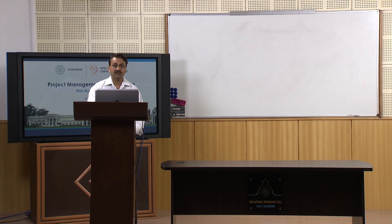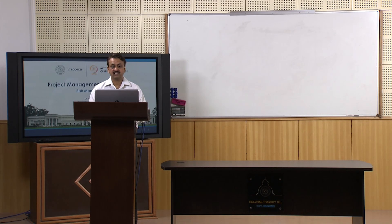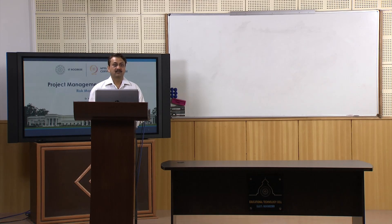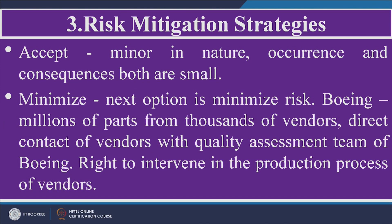That was the second point — risk analysis. There are four points in the risk management process: the first was identification of risk, the second was analysis of risk, and now let us look at the third point, which is risk mitigation — how to mitigate risk. If the risk is minor, simply accept it, because the consequences would not be significant.